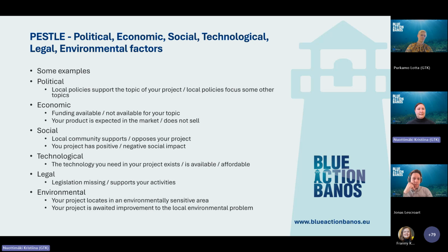Then comes PESTLE. Some examples of this are given here, but these are by no means the only ones. So political factors could, for example, be that the local policies support the topic of your project, or local policies focus on some other topics. So this might hinder the receival or execution of your project. Economic factors could mean that there's funding available for the topic of your project, or not available, or your project is expected in the market or does not sell, or you're uncertain how it will sell.